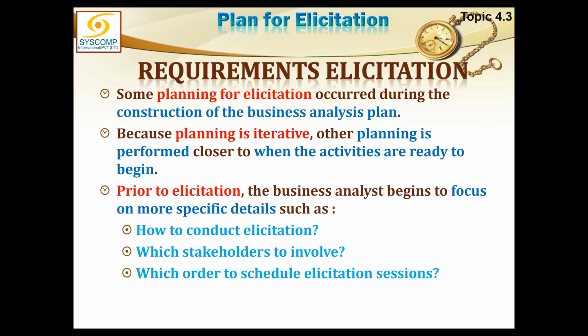I would give you an example. I was involved in one of the business process engineering projects in which we were talking to National Highway Authority, and with National Highway Authority, I planned the whole elicitation process, and I issued them a program: how and when I want to interview them, I want to discuss with them. The first tier was the top level management. Then when I went to the top level management, I asked them who else could have more information, and then I involved that focus group in the next stage.